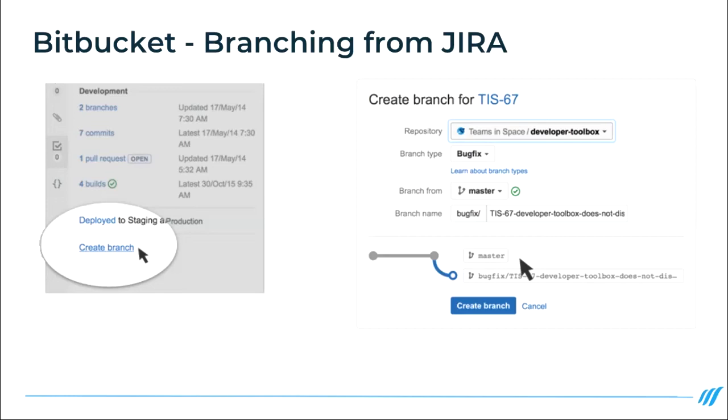By linking the version control system to the issue tracking system, Jira, you get a linking between why we're doing the work, represented by the ticket, and the changes that were effected in order to make the change, i.e. the code changes within Bitbucket. You get that traceability. It's all part of the story of transparency and traceability.